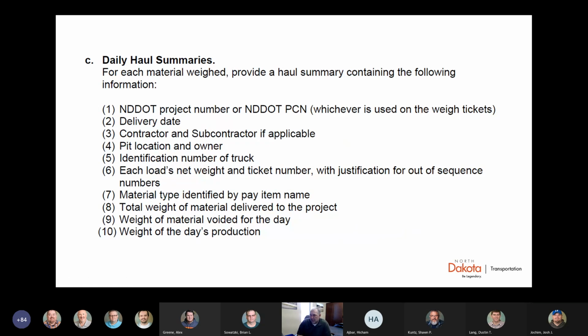And it has to happen in the field, because once it gets to the point where you're putting it into the system, and everybody probably does it differently, but the way we do it is a ticket taker will get the tickets, get the haul sheet at the end of the day, reconcile the haul sheet, get the contractor and DOT signature on it, and it gets loaded in.